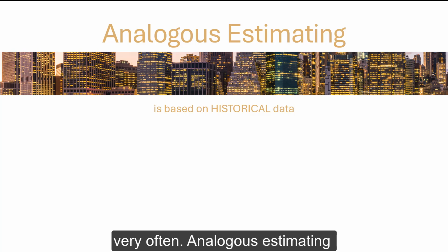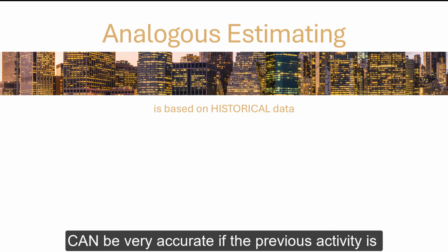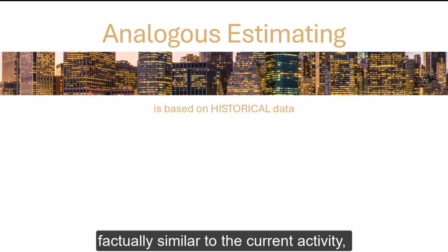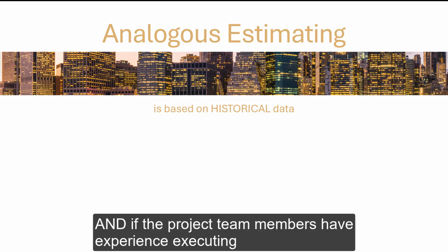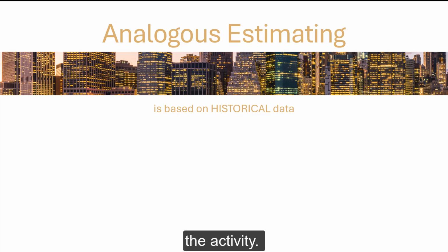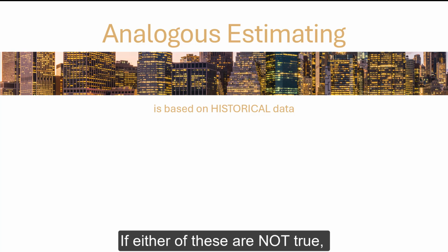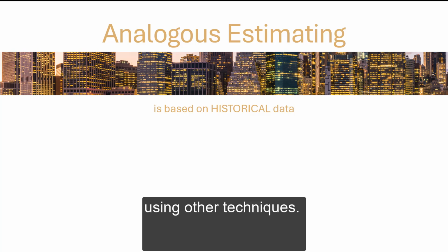Analogous estimating can be very accurate if the previous activity is in fact factually similar to the current activity and if the project team members have experience executing the activity. If either of these are not true, then we should further refine the estimation in later stages using other techniques.